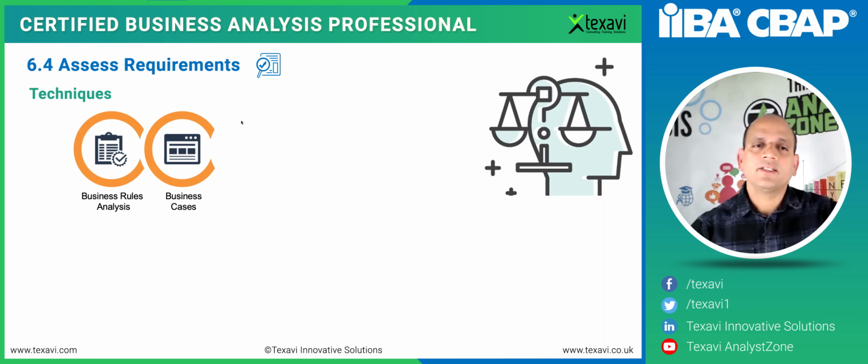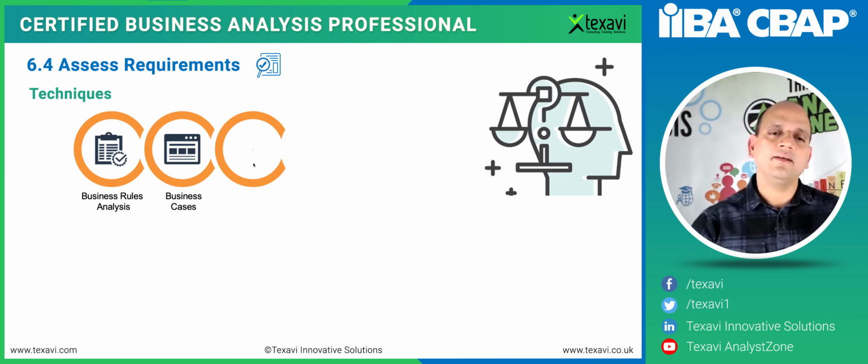We need to understand what is the business case for the requirement. If you really want to accommodate a requirement which has a significant impact in the way that the project has been designed or product has been created, then we need to, again, create a business case just for that, to accommodate the effect of whether it has a significant architectural impact or a design impact, coding impact, people, new skills to be brought in. So perhaps the business case needs to be created or updated to reflect that.